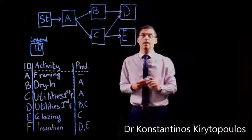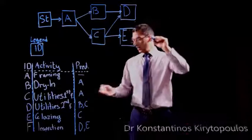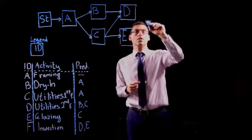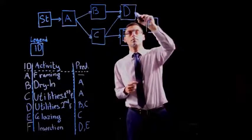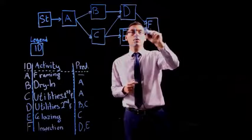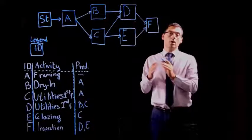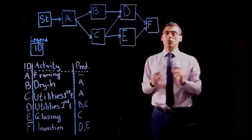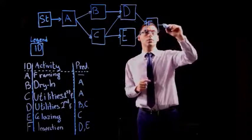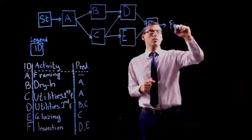The next activity would be activity F and F comes after D and E. So there you go. That's F. And before you say that I'm done, don't forget the milestone of the end of the project. So finishing milestone. There you go. I have another one that's finishing.